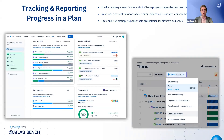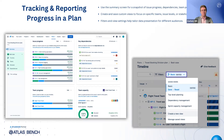Once your plan is set up and running, you'll want to keep an eye on how things are progressing. The summary screen provides a quick, high-level snapshot that includes issue progress, key dependencies, team progress, and overall capacity within the chosen date range — a great go-to for understanding the health of your plan at a glance. For more tailored reporting, you can create custom views that let you filter and highlight specific details — maybe just one team's work or a certain type of issue. By adjusting your filters and view settings, you can emphasize the most relevant aspects for each audience and save that configuration for easy access later. This flexibility ensures that everyone, from executives to individual team leads, gets exactly the information they need.